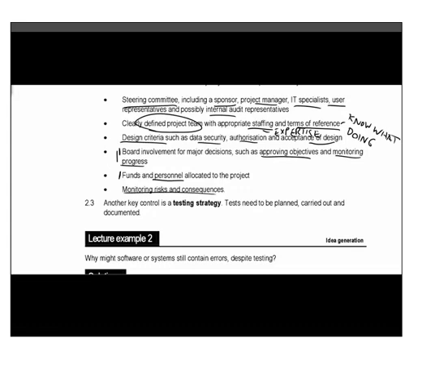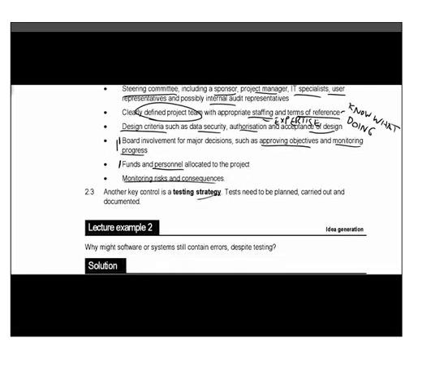There needs to be a clear and realistic budget. Again, a key problem with a lot of IT projects is that they don't have enough budget in place, and therefore they go over and that causes problems, and that they have proper personnel. They know who they have, they've got the right skills, and they've got enough time to deal with it. And you would expect to have, in the overall control framework for a large IT project, some ongoing monitoring of risks. So regularly the team need to be reviewing what could go wrong and how they are dealing with those risks. You will also want to have in place a testing strategy.